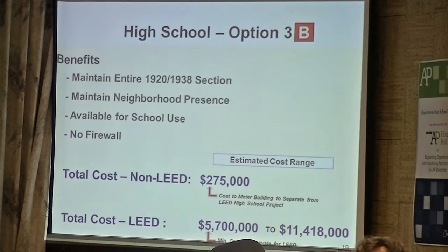Well, that was a question. When? He said 2000. Yes, I know, but that's when it's supposed to be finished. Yeah, the spring of 2016 is when, and even probably that school year, as you wrap up and start getting into the building. Prior to that, you would have to decide what you're going to do with the building. And then if it's not going to be a LEED building, you would have to have it in the project somehow to separate those utilities before we can submit to the USGBC for the LEED certification of the project.